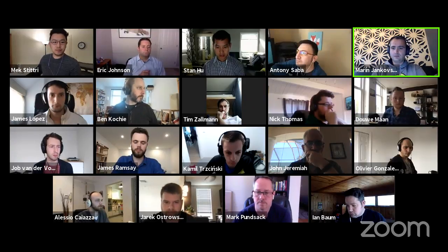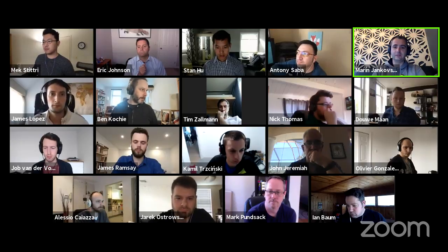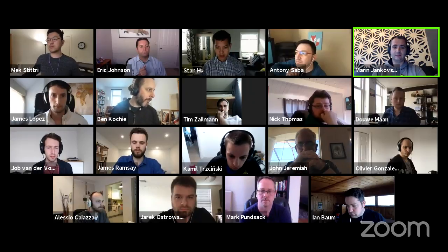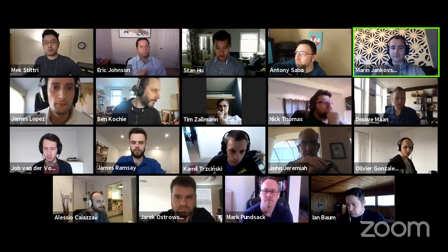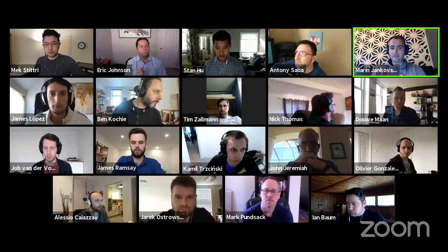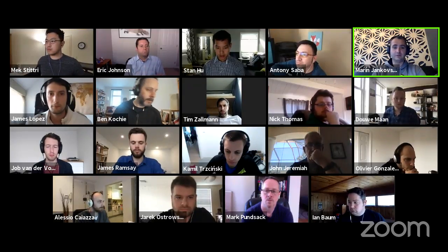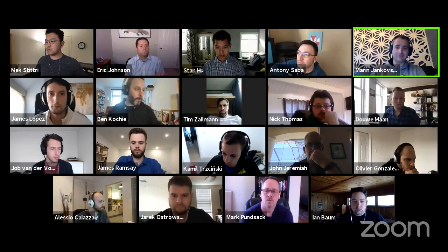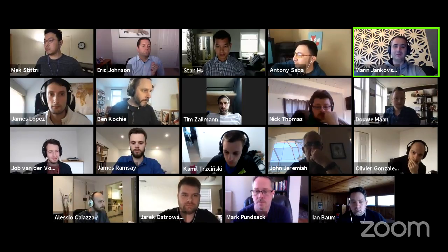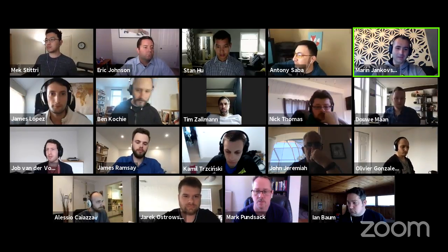Thanks, Mac. I want to kick off by saying that release trainees were actually doing the amount of work that the release managers were doing as well. So Philippe and Myra were extremely helpful this release. I want to give a shout out to them because I think they did an amazing job there. Another thing worth noting is that we were disciplined about our scopes. We purposely targeted that we are not going to work weekends no matter what. That allowed us to actually cut scope and move with the release without causing anyone more pain.